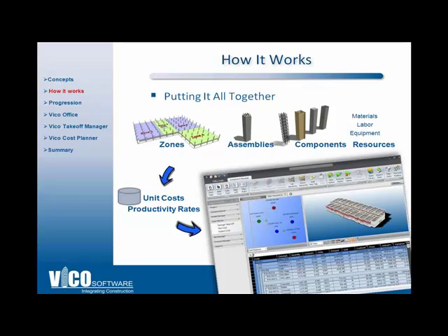So this system allows you not only to give real-time feedback to the client, but also use the quantities for more than just estimating. Use the quantities for scheduling and use the quantities with production rates to generate a more accurate schedule with accurate durations and more accurate logic.